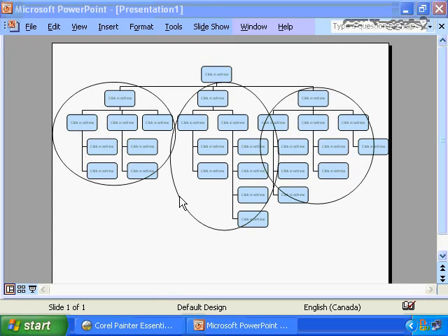We see this in action with this hypothetical organization chart. By creating 3 separate sub-teams, we've effectively limited the amount of communications that has to happen, where only the members of sub-teams communicate with each other, and then we have intercommunications across the team leaders, drastically reducing the communications channels. Instead of one very large communications process that must be managed, we actually have 4 very small communications processes that are managed, and this results in much more effective, much more efficient project communications.